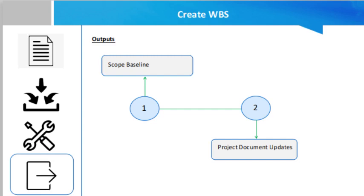The first output is the scope baseline, which is the approved version of a scope statement, the Work Breakdown Structure, and its associated WBS dictionary. This can be changed only through formal change control procedures and is used as a basis for comparison. Project document updates are another output — these may include requirements documentation, which may need to be updated if approved change requests result from the Create WBS process.